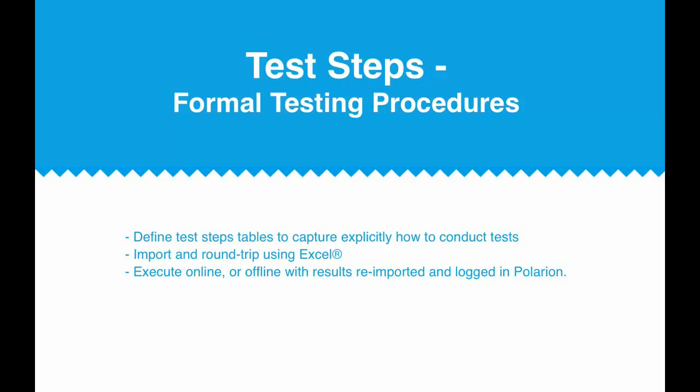I don't like requirements to be really big objects with a long textual description, because if you modify just one single paragraph of such a big object, it's hard to estimate the impact. You have no granular traceability between business requirements and functional requirements. You have just big objects linked together.